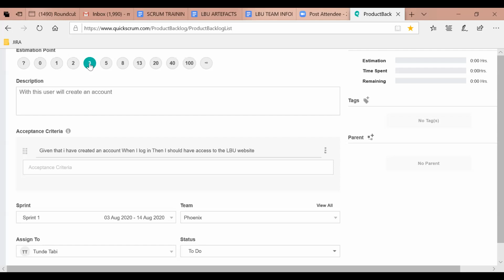So if we are now sizing the story, and somebody says 8 and somebody else says 2, it provokes a conversation. When it provokes a conversation, the person that says 8 is then saying, it is 8 because we have to do the GDPR coding.